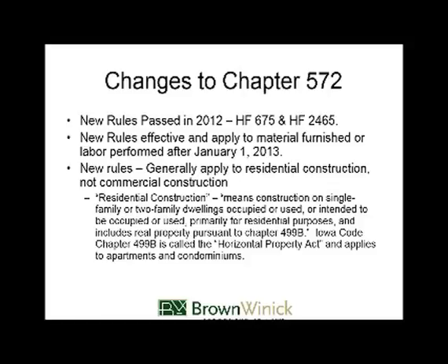So as a big picture, the rules took effect on January 1st of 2013. For the most part, that's going to apply to just about any project that is out there. Because 2 years later, there's very few projects that take that long to get constructed. Something that these rules might not apply to would be something like a school project that was phased in, where they have to do the work in the summer when the students are not there, or do it over winter. So that might be a situation where you would see that these rules are not going to apply. But I think that's a very rare situation.